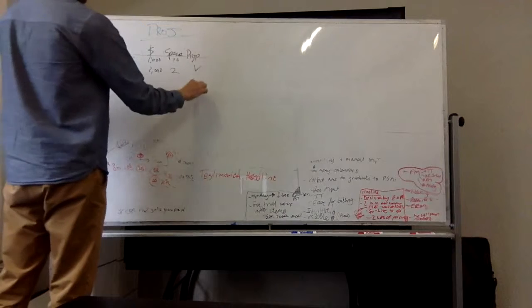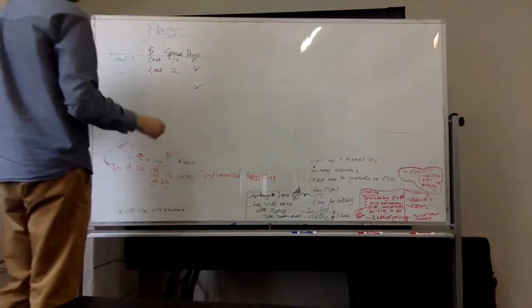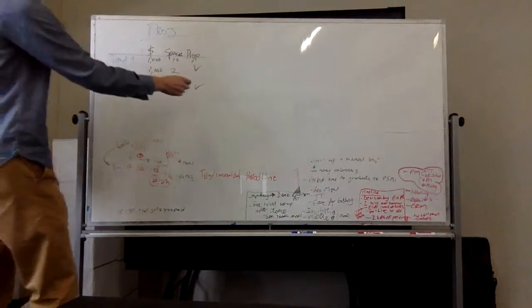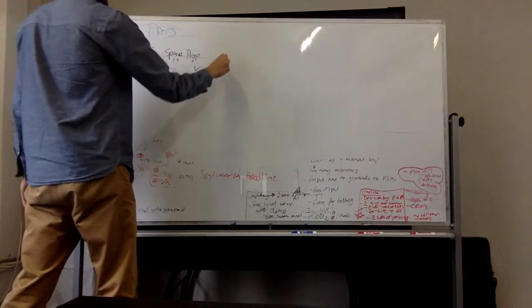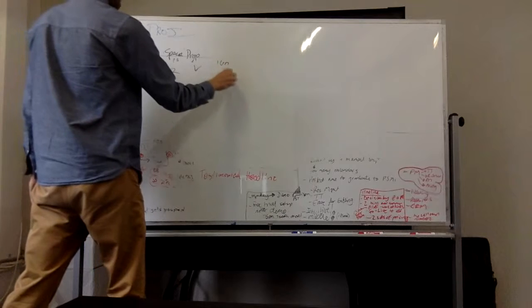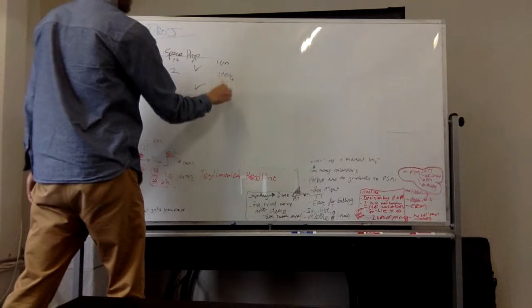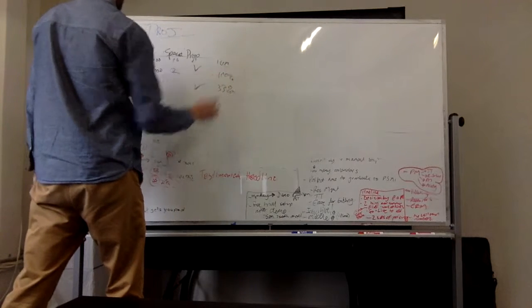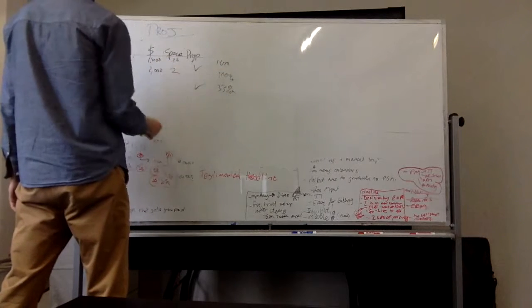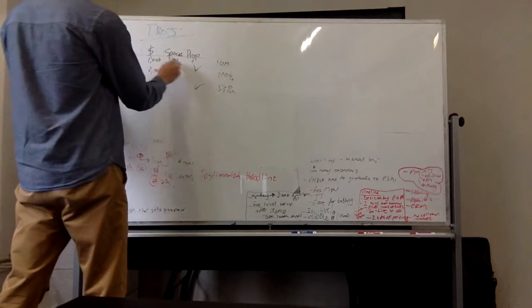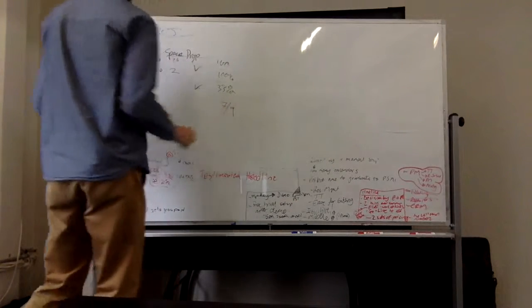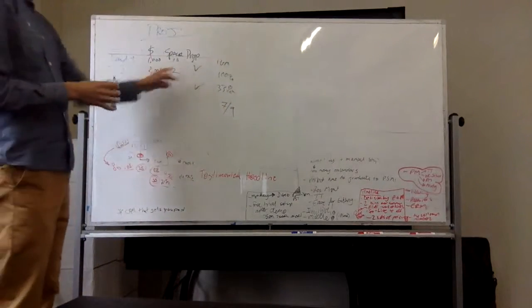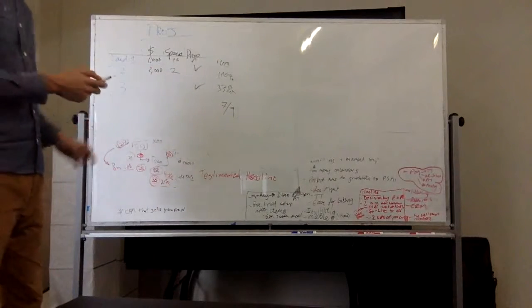Okay, we have a proposal in 3, but we don't have a price and specs. So this is how he would determine percent complete, on a combination of, okay, this is 100%, this is 100%, and this is 33%. And then he adds all of those up. So it's 9. So he's, what is it, 1, 2, 3, 4, 5, 6, 7. So he's 7/9 through the project based on this. And that's how he's currently tracking.